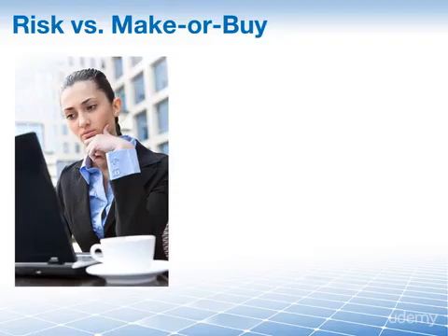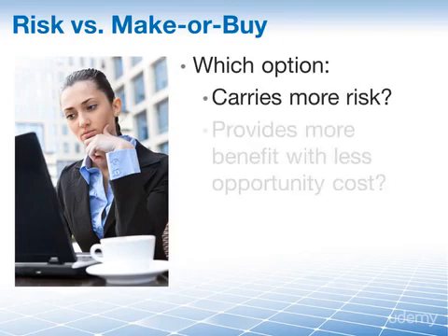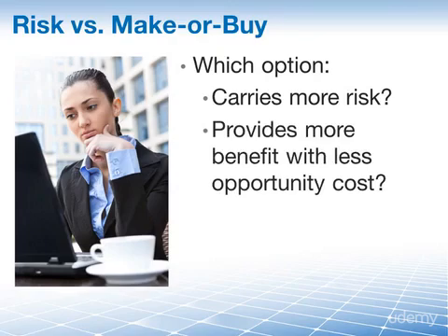As part of your project, when you plan the procurements, you are likely to conduct a make or buy analysis in order to come to a make or buy decision. This is part of what you do as you review the risks. You will ask many questions, such as which option, make or buy, carries more risk for you? Which of the two provides greater benefit with less opportunity cost?